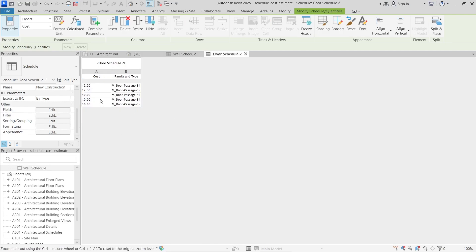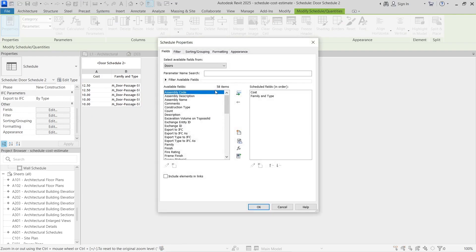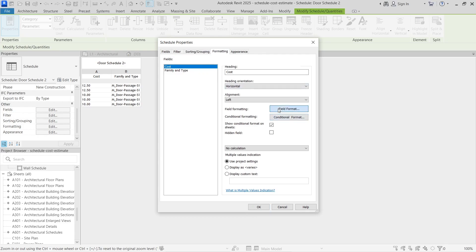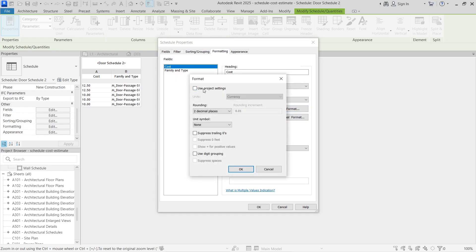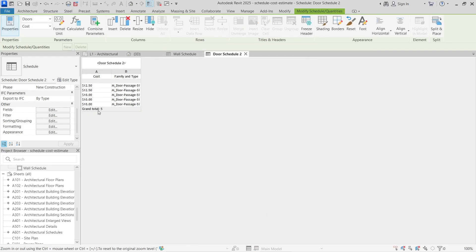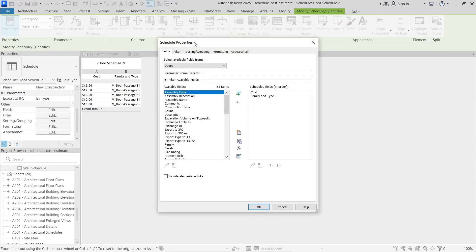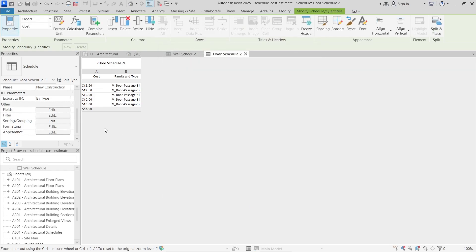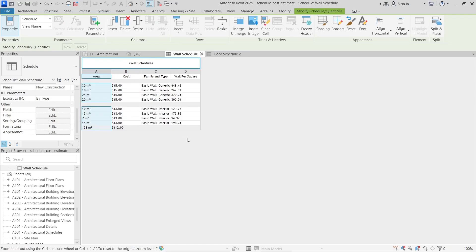Our wall schedule now shows $112 in total. For the door schedule, go to Sorting and select Grand Totals, then in Formatting change Cost to show the dollar sign. I noticed I forgot to enable Calculate Totals for the doors — go into the Cost field under Formatting, select Calculate the Total, and click OK. That gives us a grand total of $55 for all the doors.